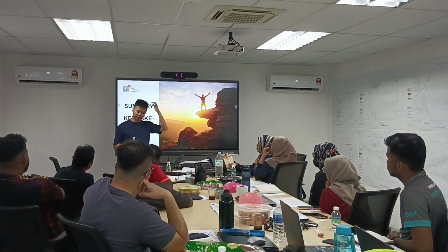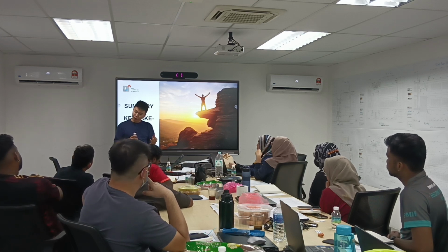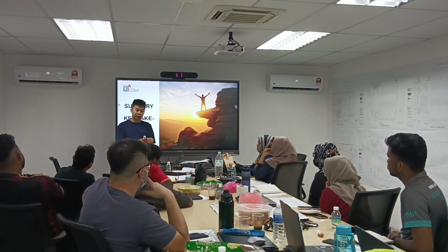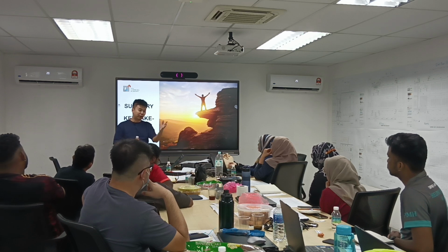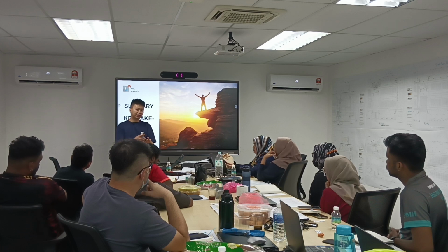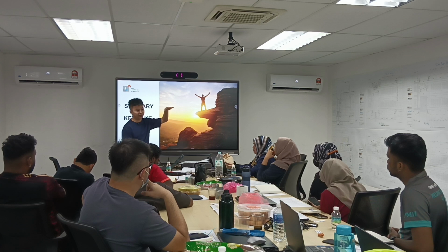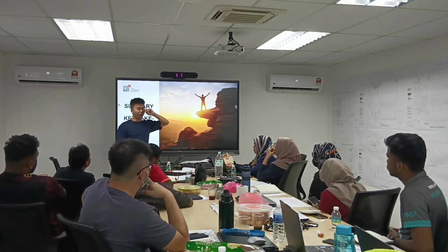So in the CCC, we got like 30 something items. So the mainly ones, mostly you will see are the bomba, the landscape inspection, TNB supporting letter, the telco supporting letters, and those are mainly the ones the M&E guy will see. Actually, total is 30 something. So including the MPKU, the JKH, the wastewater, the indoor water, etc., etc. So the whole list is very comprehensive. You can download from the Board of Architect website. They actually give you a whole comprehensive list.